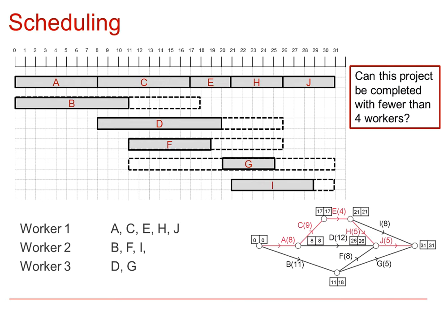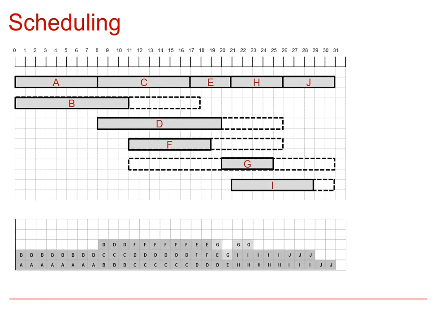So the initial solution, where all the activities started at the earliest start time, was not the most efficient, and you need to be able to interpret the resource histograms and use the floats where appropriate to reschedule the start times. The resource histogram could then be redrawn accordingly, and this is sometimes called flattening it.